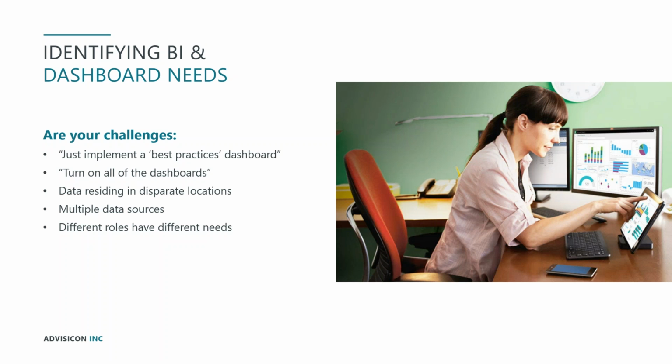And so if you've got an open PO that is not going to be spent on until the fourth quarter and you're in the second quarter and they're seeing that you're not trending in the direction that they would expect, are you at risk of having them claw back some of your funding because they see that you're underspending and they may have a different expectation? So you've certainly got an opportunity in delivering your BI and dashboard solutions to address a problem like that proactively.